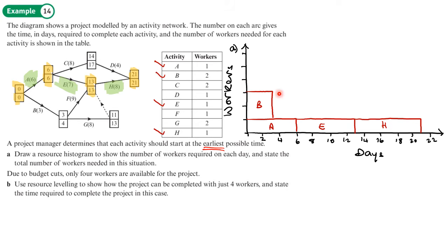Right, now what we're looking for now is activities that we can start at 3 because we don't want to leave gaps. I don't want to go on to C, have a gap, put C in and then try and slot things in. So what activities can start at 3 as early as possible? Well, both F and G, their earliest start time is 3, so I could put F or G in. So I'll put F in first.